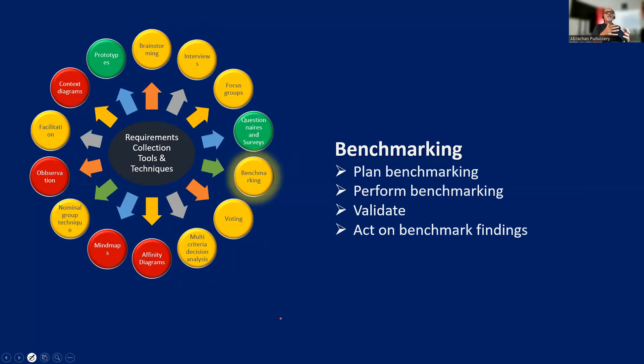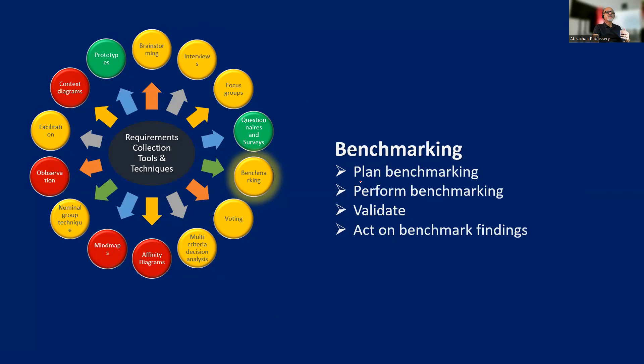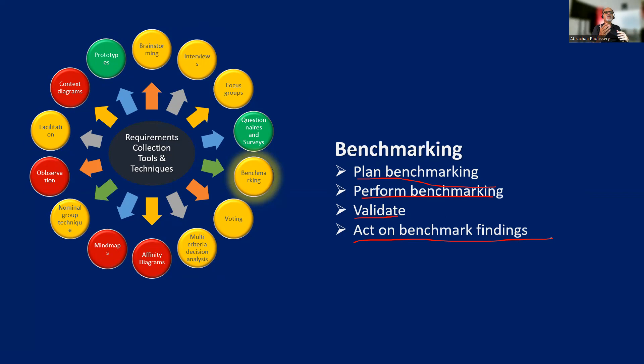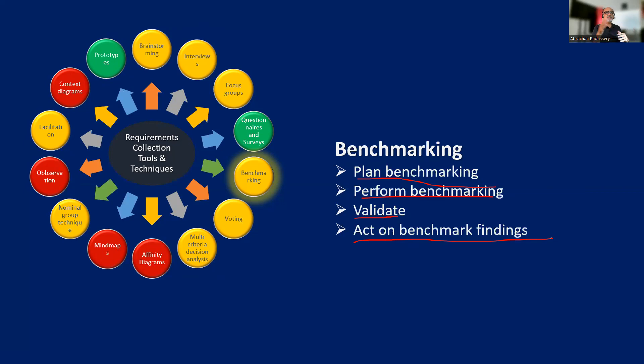Then benchmarking. Benchmarking means comparing our project or the product with a better product so that we can learn from the better product much quickly. You have to plan for benchmarking, perform benchmarking, validate the findings, and act on the benchmark findings. In one organization where I worked, our quality management practices were considered the best in the industry. So another company wanted to benchmark their processes with our processes. But if you don't act on the benchmark findings, the whole effort is a waste of time and energy.